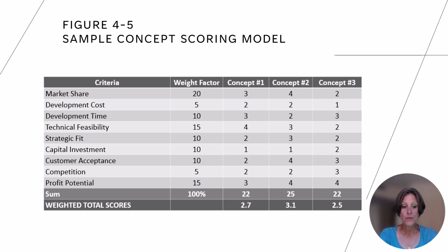not radically changed. However, quality management of the new product is extremely important since customers have established expectations from prior product releases. Quality management is thus a key element of Stage 4 work to test the final product and manufacturing process. Some quality management principles that translate to Stage 4 in a Waterfall NPD process include quality assurance planning, sampling, failure mode analysis, check sheets, flow charts, and Pareto charts. Quality management and lean manufacturing overlap, so additional tools are presented in Part 4 in a later episode.